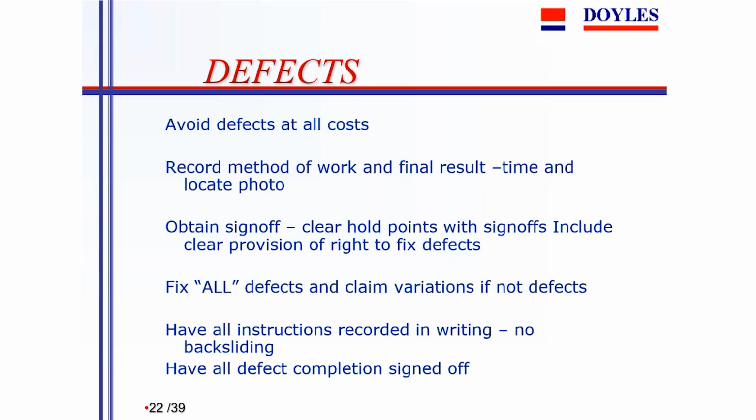It's also important to obtain sign-offs, to have hold points that are cleared officially with a sign-off, so that somebody has actually checked it and said, yes, that's okay. Otherwise, one's got a lot of work done and no one has really inspected it.